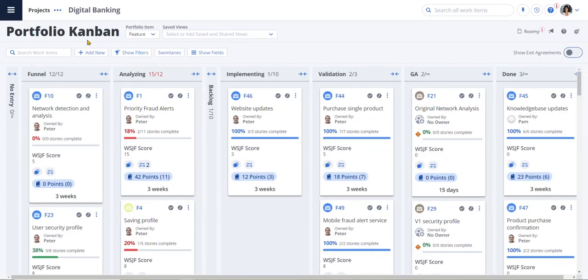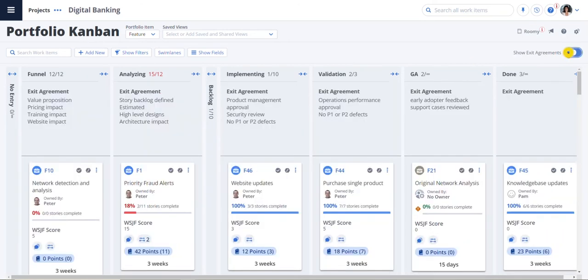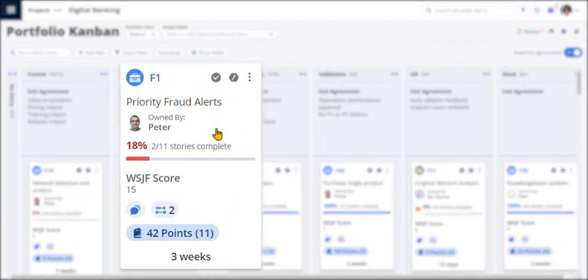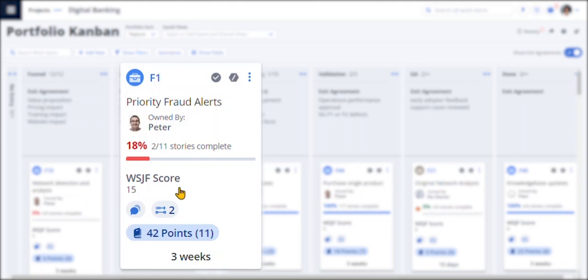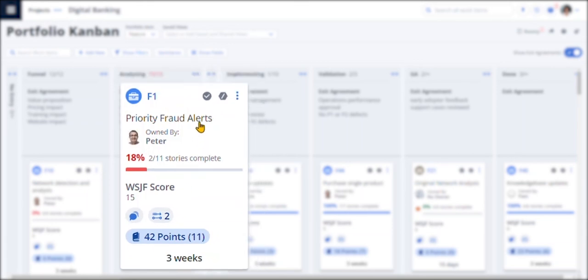Patrick and the feature teams use their Kanban to see the flow of work through the development lifecycle, complete with exit agreements, using work-in-progress limits at each phase of the lifecycle. The cards show the metrics the Agile PMO and others use to track work, including WISGIF score to sequence the jobs we want to work on. Of course, teams can choose their own lifecycle and add any metrics to personalize their view. The team is currently analyzing priority fraud alerts and knows this is an important feature for the business.